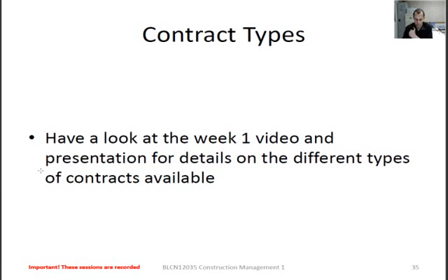This one, in the scenarios, or in actual questions, says typical documents. Like, what would you say? Like scopes, obviously scopes of work, but bills of quantities? Yes, that's a good example. If you are going to use, for instance, a remeasurable type contract, bills of quantities is always a good start, but also a scope of work, specifications, EIA, environmental management plans, that stuff that you sent me recently. That would typically be all of the types of documents that you would want to list in there. And of course, list them, give a short description, bullet points. That's what I want there.